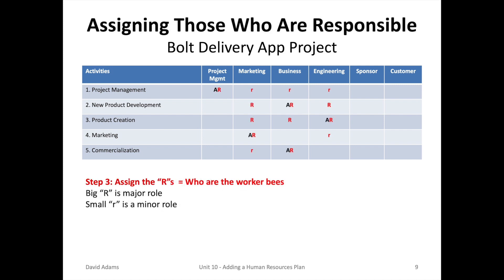The next letter to assign is R — who is responsible? These are the worker bees, and you can put a big R for a major role or a little r for a minor role. For instance, in project management, you can see the project management activity where the project manager is both accountable and does the majority of the work, but marketing, business, and engineering also participate.